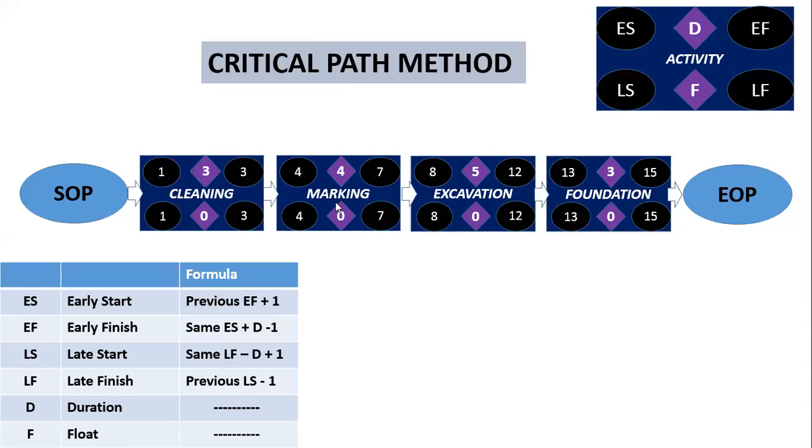Then we are coming to the marking activity. What is the late finish? 8 minus 1, right? That is 7. Okay, next. The late start is 7 minus 4 plus 1, that is 4.